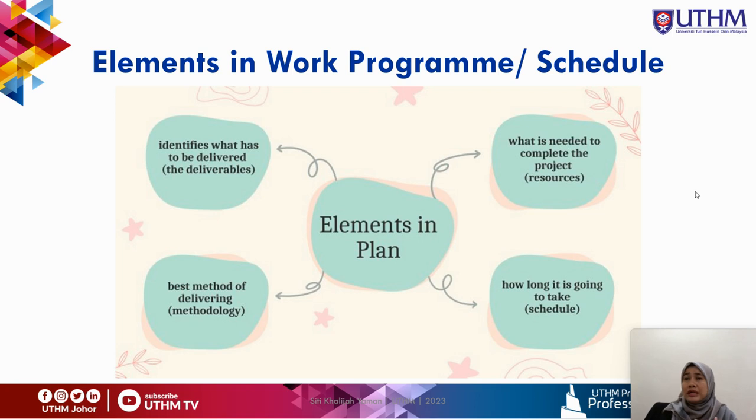In a construction project, we don't deliver material all at one time, because there will be storage issues, security issues, and many more issues related to the project. That's why we only deliver material a few days or a week before the task starts. So that's why we need to plan ahead, and plan what resources are required for you to complete the project.